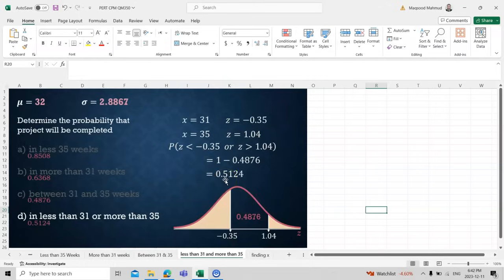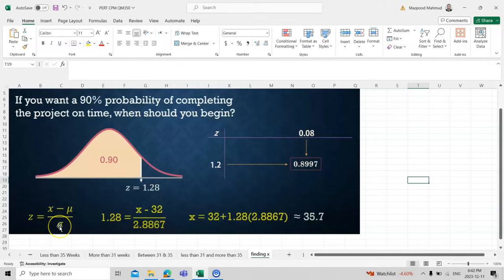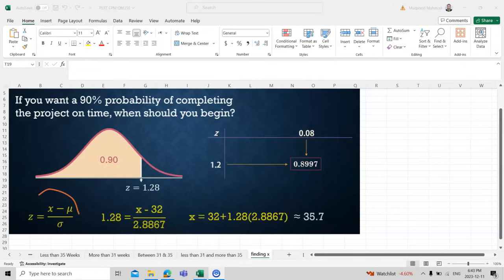Now we consider the reverse case: if the z-score is given as 1.208, along with mu and sigma, how do we find x? If we want a 90% probability of completing the project on time, when should we plan to finish? We rearrange the z-score formula — shifting sigma to the left-hand side and then moving mu — to solve for x directly.